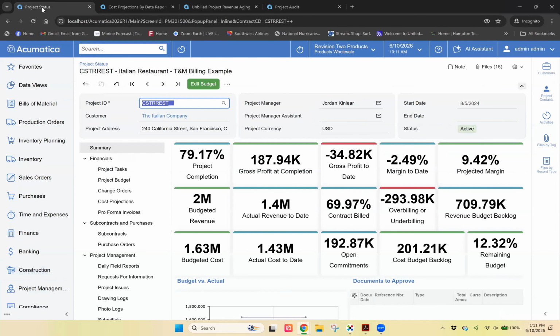So along those lines, going back to this project status report, this also helps earlier in a job, not necessarily a project like this that is pretty far along, but when you're looking at the time value of money and trying to decide when you're going to do your spend on your materials, those purchase orders, things like that you need in order to fulfill the project. That can give you visibility into whether we buy now because we know what the price is now and can lock in our margin, or do we wait?